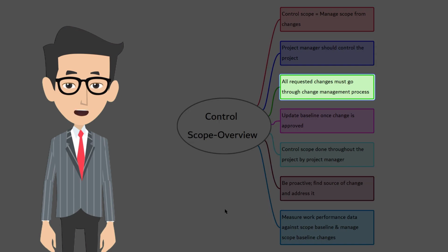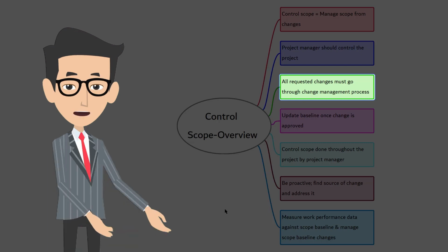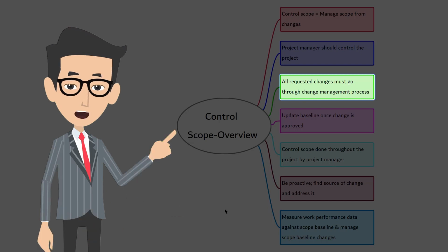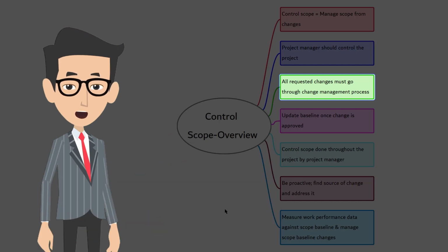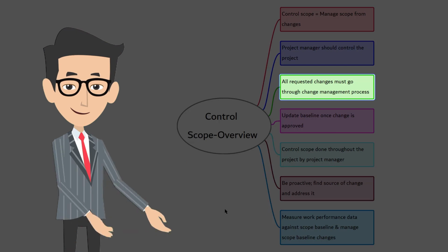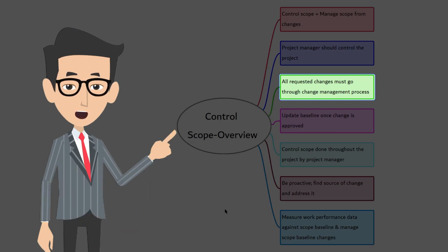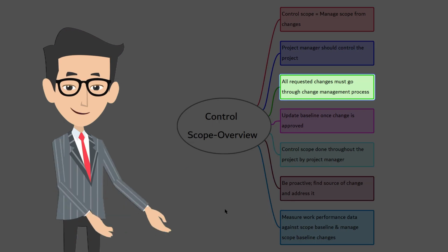Your job as a project manager is not just to process other people's changes, it is to control the project with respect to the project management plan to meet all the baselines. Therefore, you should not be easily influenced, and you as a project manager should not let others add scope or change scope without following the change management plan. The project manager has to ensure that the suggested changes are within the planned scope of the project.